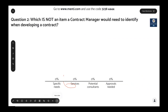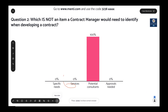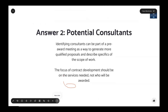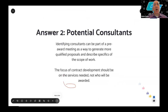Second Mentimeter question: which is not an item a contract manager would need to identify when developing the contract? Choices are specific needs, services, potential consultants, or approvals needed. The correct answer is potential consultants. You can identify consultants in a pre-award meeting to generate more qualified proposals and encourage them to bid, and describe the specifics of the scope of work within the pre-bid meeting. However, the focus of contract development should be on the services needed, not specifically who we're going to award it to.